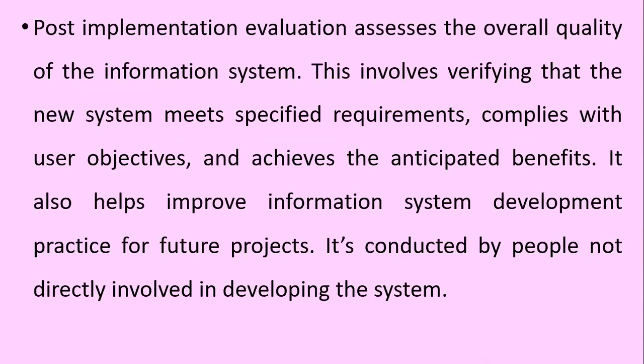Post-implementation evaluation assesses the overall quality of the information system. This involves verifying that the new system meets specified requirements, complies with user objectives, and achieves the anticipated benefits. It also helps improve information system development practice for future projects. It's conducted by people not directly involved in developing the system.